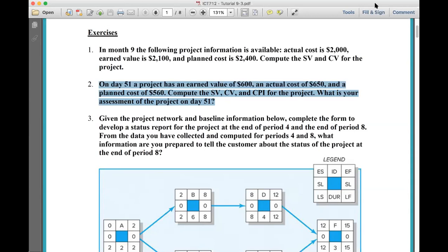Okay, the cost variance is, let's say, minus... I need the number, specifically, if you can give me the number. Minus 50. Okay, yes, the cost variance is minus 50. That's correct. What about the schedule variance? It's 40. Okay, 40. So if the cost variance is minus 50, what does that mean? It means over budget, sir.